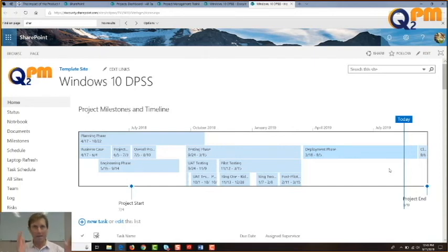The project plan lays out all of the detailed steps of how we're going to do this in terms of the tasks, the milestones, and the dates associated with it, and we'll have real human being names associated with all of those tasks. It takes us about 2 weeks to put that together. Then we're going to have a real timeline, and you'll be able to see how your plan will begin executing.